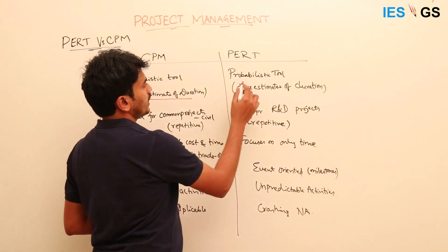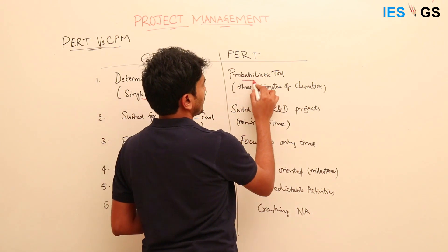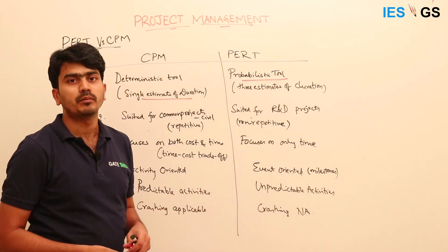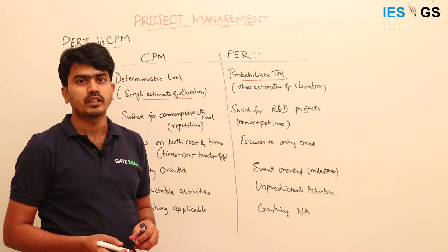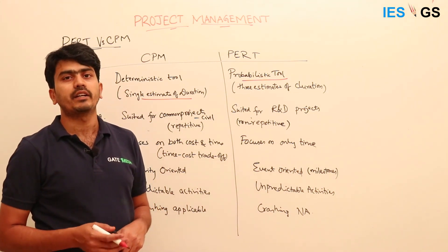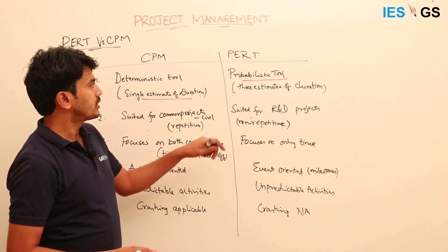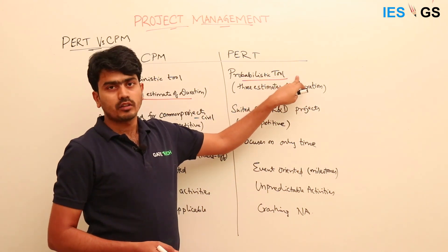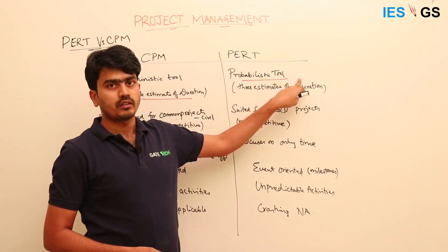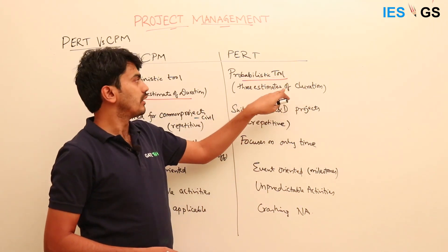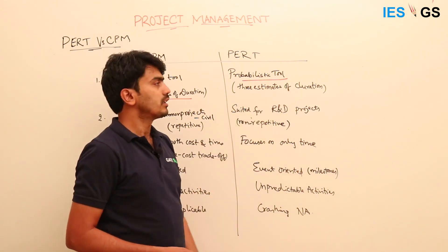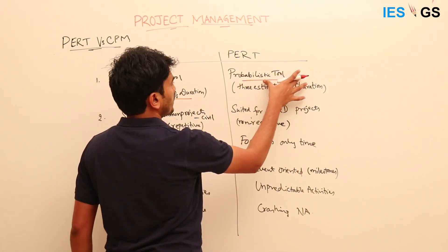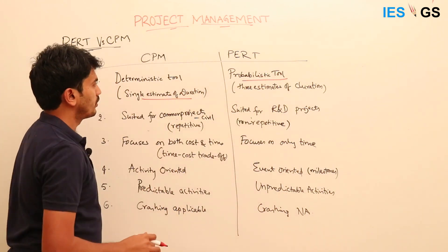PERT is a probabilistic tool in the sense that it uses multiple estimates in order to arrive at activity duration, because most of the activity times are not known — they are uncertain. So PERT is referred to as a probabilistic tool and CPM is a deterministic tool.